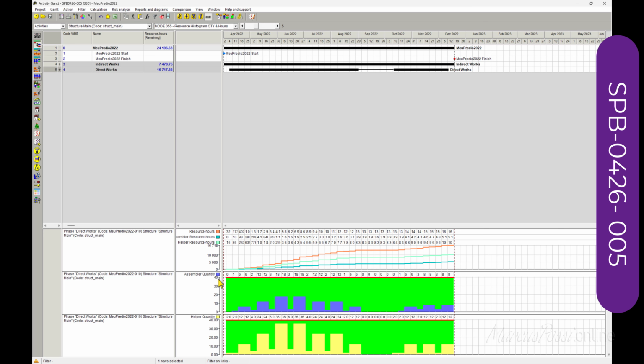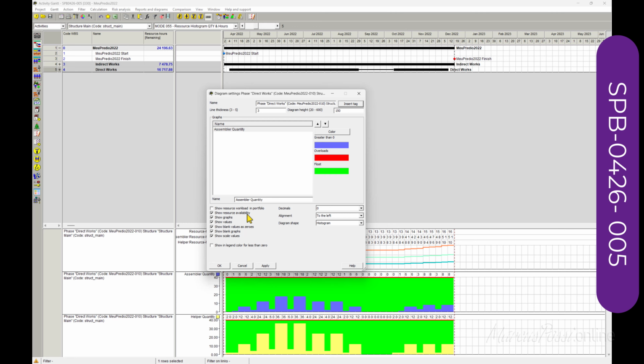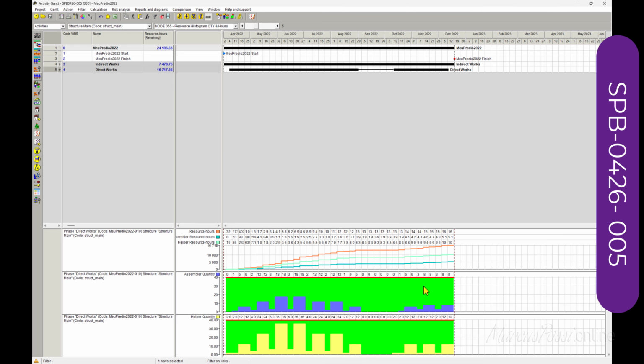Don't you think that you should dismiss or transfer some assemblers to other project sites? There is too much availability here. It's not profitable. Helpers and assemblers are being used really under our limits.